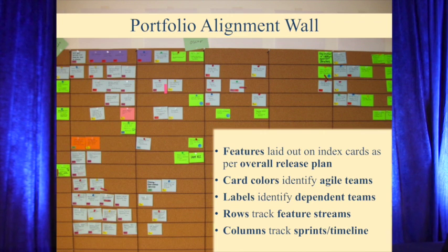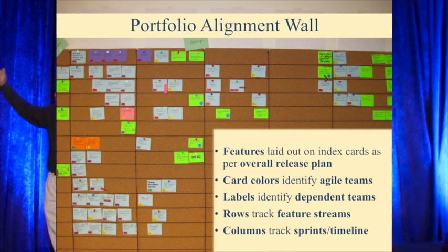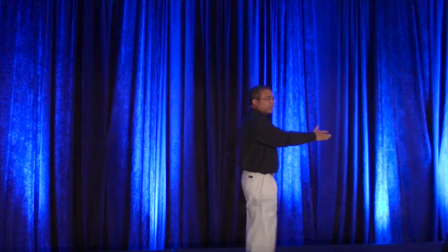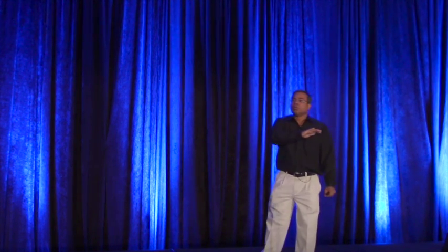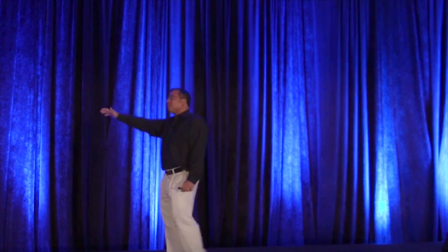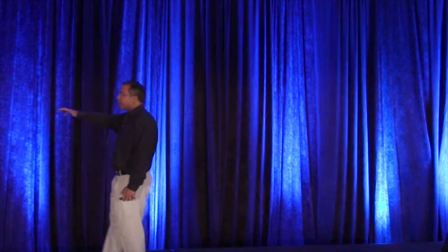And so those red dots indicate dependent teams. So that means in that month, let's say March, that feature, let's say a big advanced functionality of reporting, 7 or 8 teams have to get together. Names of the teams are written up there, and they're on that card. So now everybody knows the dependencies. This program management office meets once a week, and they're able to manage risk, track the flow of value up, over and above what's happening at the team level, right?